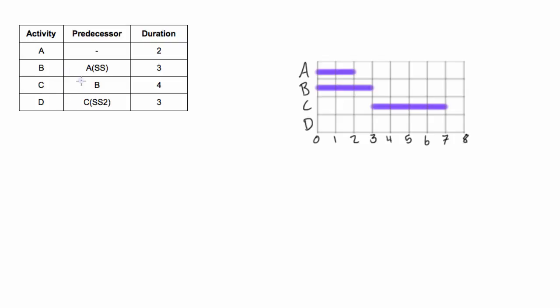Now activity D depends on activity C with lag of two. SS2 means it's a start-start relationship with a lag of two days. So what we do is we come down, we find where does C start? Well C is starting on this three marker here, the end of day three and then we're going to add two days because that's where our lag is, so one, two and this is where D starts and D is a duration of three days so we go one, two, three.